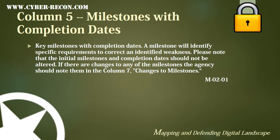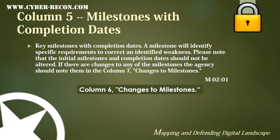Column 5 is milestones with completion dates. A milestone will identify specific requirements to correct an identified weakness. Please note that the initial milestone and completion date should not be altered. If there are any changes to the milestones, the agency should note them in column 7, changes to milestones. It's important to note that this appears to be an error — column 6 is actually changes to milestones, and this discrepancy in alignment of the locked columns would explain why column 4 was not indicated as locked in the instructions.